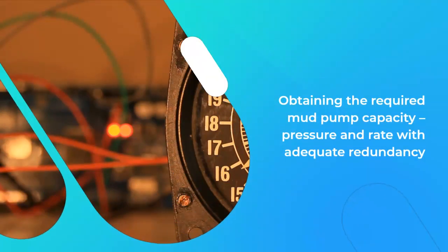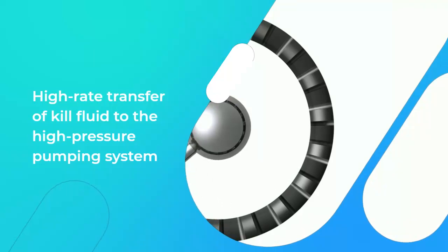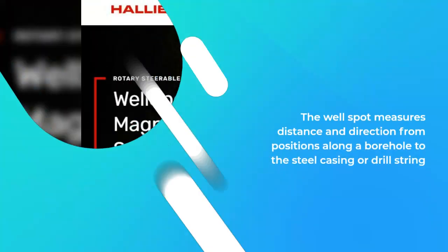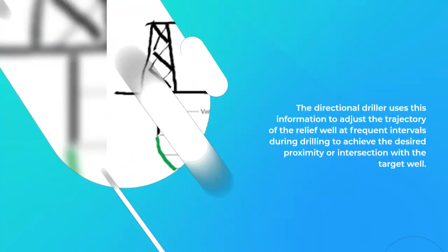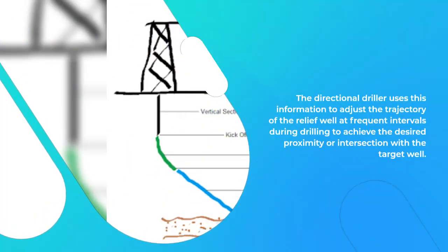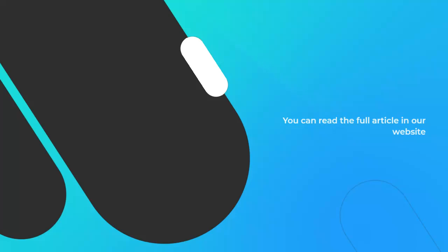Obtain the required mud pump capacity, pressure, and rate with adequate redundancy, along with high-rate transfer of kill fluid to the high-pressure pumping system. The well spot measures distance and direction from positions along a borehole to the steel casing or drill string in a second borehole. The directional driller uses this information to adjust the trajectory of the relief well at frequent intervals during drilling to achieve the desired proximity or intersection with the target well.